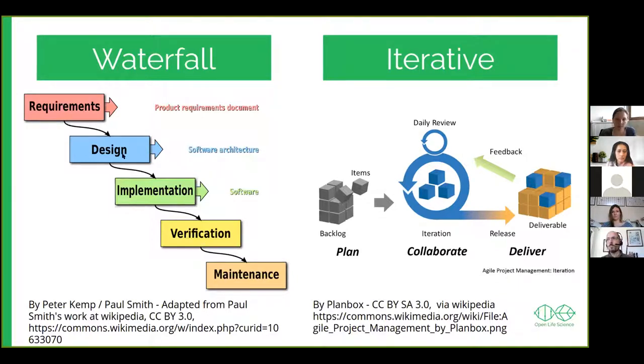So you can imagine that if at any point during design or during the implementation or one of the later stages, there's something that you need to change about the plan, this process is rather rigid and doesn't really allow this. And so the iterative process is a bit more generic or a bit more responsive. It typically starts by breaking a larger problem into smaller chunks so that they become more actionable. Exactly what small means differs a lot between different paradigms, but it can be something that lasts a day, it can be something that lasts a few hours.